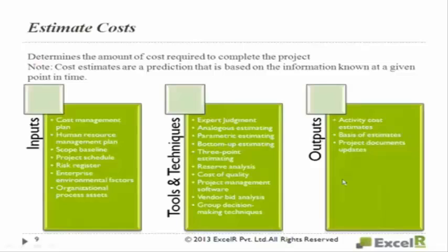Thank you. So outputs. Activity cost estimate. Now you will get activity 1, $5. You will get an estimation of cost of each activity. And remember, when you are doing the cost estimation, you have to look into many things like labor cost, material cost, equipment cost, facilities cost, information technology costs. Even your interest also you have to calculate. When I say interest, 2% interest, if you take a loan, you have to pay some interest, right? Interest charges, inflation allowance, exchange rates,